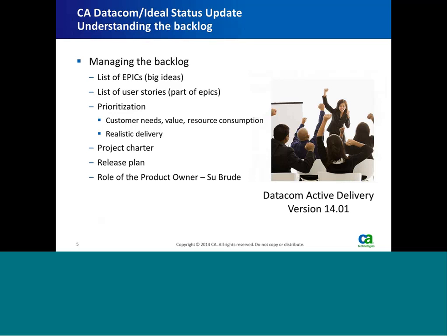So what we have to do is take a reasonable amount of time, let's say a 3 or 6 month period, and say, let's build a project charter. Let's look at what are the top items that we can fit into this 3 to 6 month period, and let's go get those done. Most likely, within the 3 or 6 month period, those will still be very important items, and they'll still be very valuable to the client.